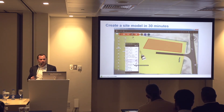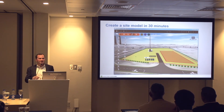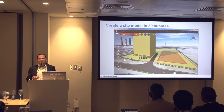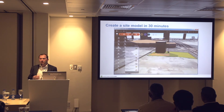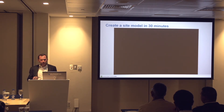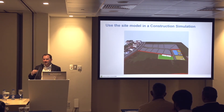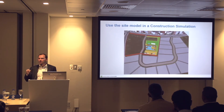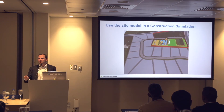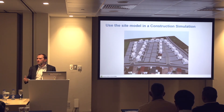If you're using it for master planning you can do that as well. If you've got a design model you can use that too. It allows you to really quickly build out a site model. What you can then do is export that as an FBX and create a construction simulation based on the actual schedules — linking all these to a particular period so you can see how the different phases of a construction plan are going to work. It allows you to fairly quickly show your intent for how you're going to work on that site.